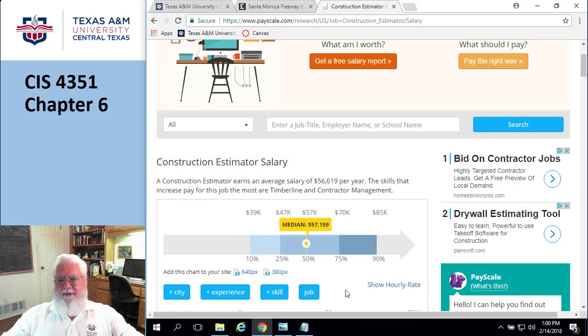Is there anything unusual about this that you need to be aware of, and it could be you might be surprised by that. And the other one, of course, is the history of similar projects. If you've done residential construction forever, then you basically know how long it takes to put native stone up versus brick. Brick goes faster. It's smaller, it's lighter, they're all uniform size, and it goes like an assembly line. Native stone, well, they'll be chipping, and they're going to be cutting, and they're going to be different sizes. It's just going to take a little bit longer. And so, yeah, you need to know those kinds of things.